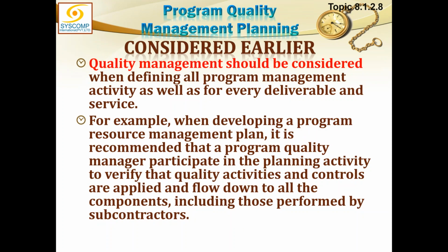Quality management should be considered when defining all the program management activity as well as for every deliverable and service. So again, I would say we have to be proactive as far as quality is concerned. For example, when developing a program resource management plan, it is recommended that a program quality manager participate in the planning activity to verify the quality activities and controls are applied and flow down to all the components, including those performed by subcontractor.